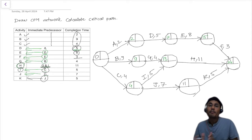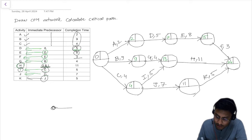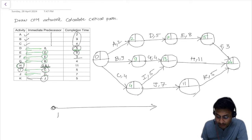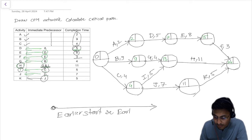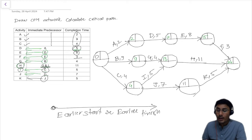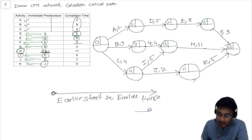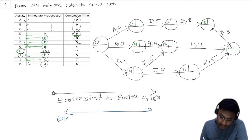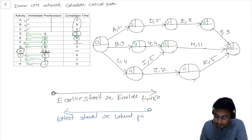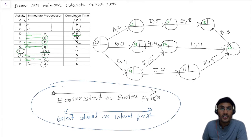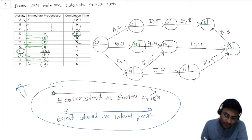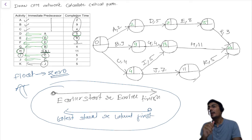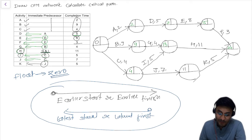This is the forward pass calculation — from left to right we calculated the early start and early finish. Now we are going to do the backward pass calculations from right to left to get the latest start and latest finish. With the help of these two passes we can identify the float, and if the float of an activity is zero, that activity is considered a critical activity.